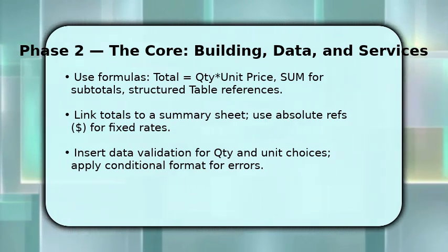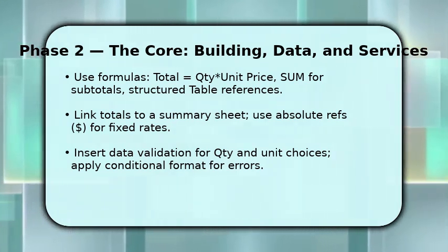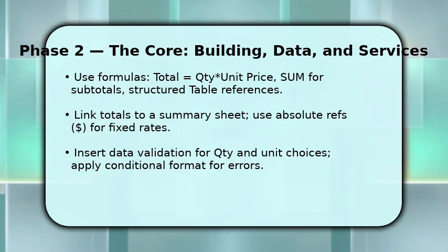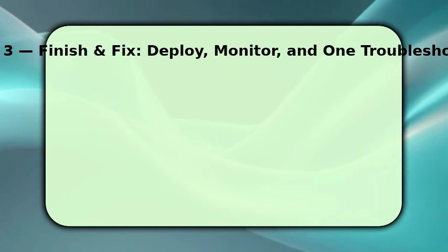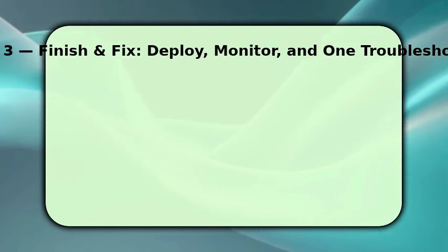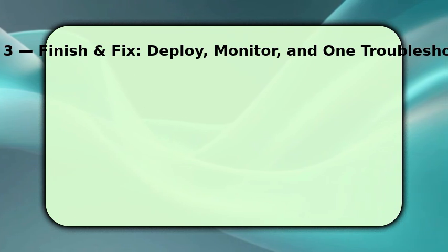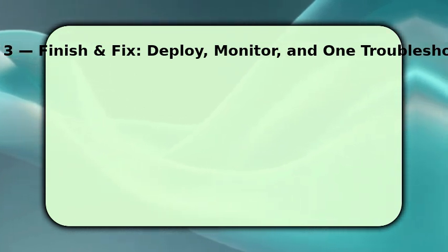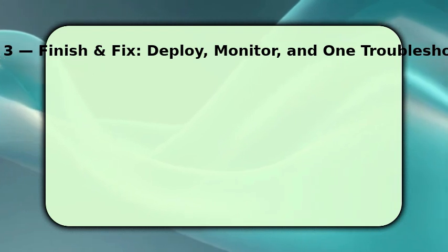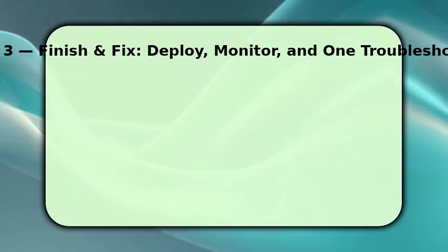Finish by reconciling and protecting your work. Cross-check summary totals against each sheet subtotal and inspect rounding or tax percentage applications. Inaccuracies often come from wrong signs or hidden rows. Then protect key cells and leave a short assumptions note for scope, rates, and contingency. Save incremental backups to avoid data loss.